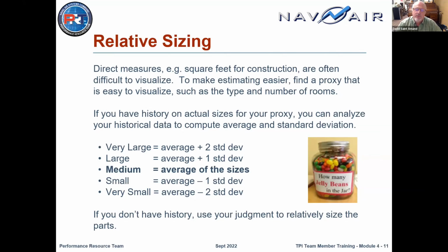But Brad can actually improve his estimate if he breaks that big pile of ditches into, I have to dig 15 ditches that are going to be 7 medium ditches and 3 really long ditches and 1 very small ditch. As you break that down now, none of Brad's estimates will be right on the money. Some will be a little bit longer, some will be a little bit shorter, but on average, it should fall right into Brad's estimating ability.